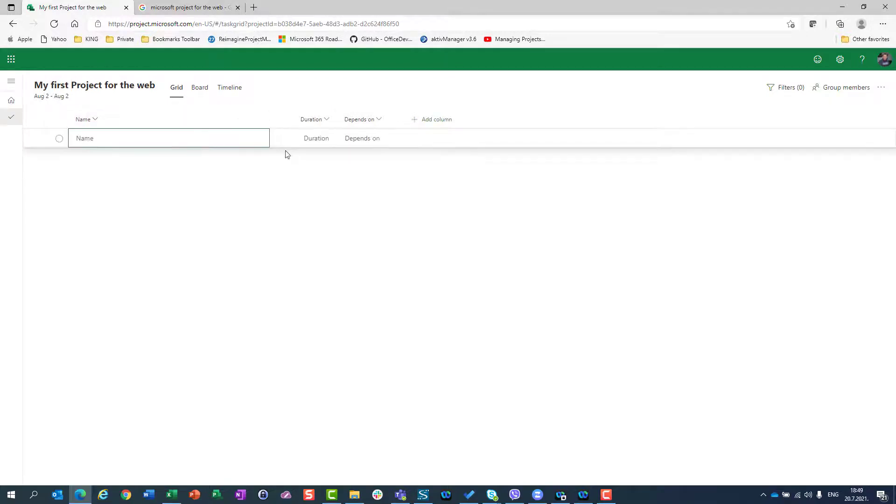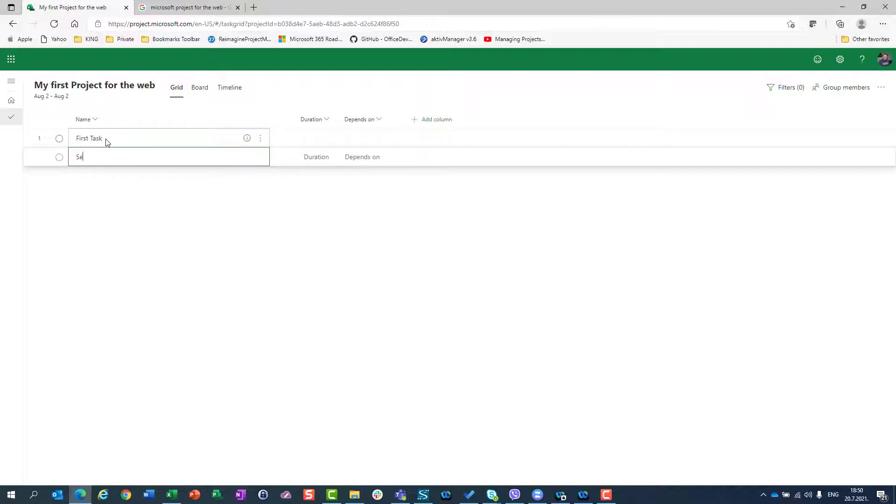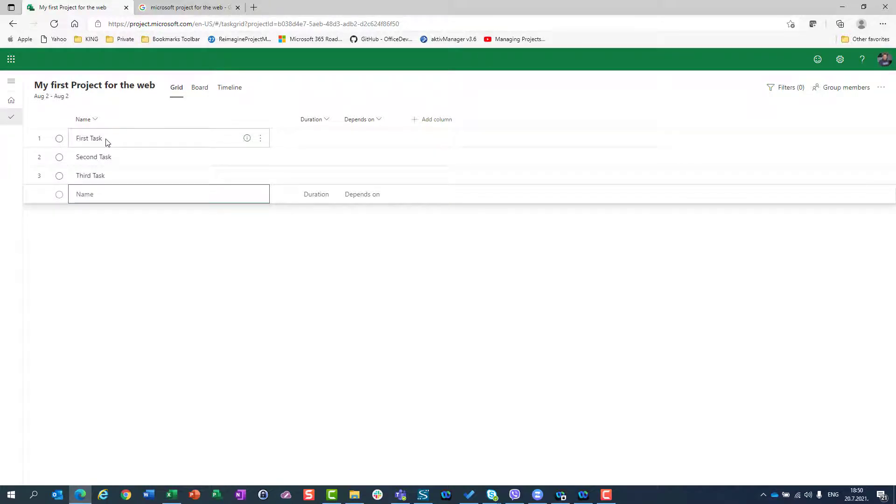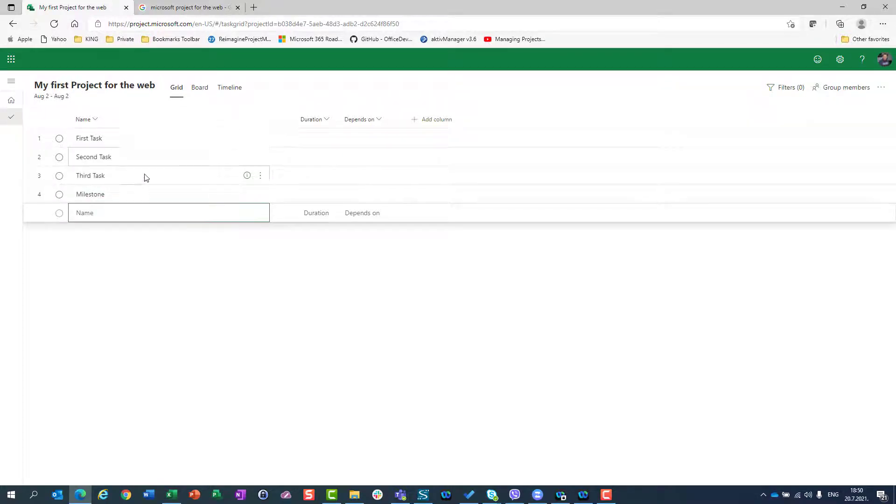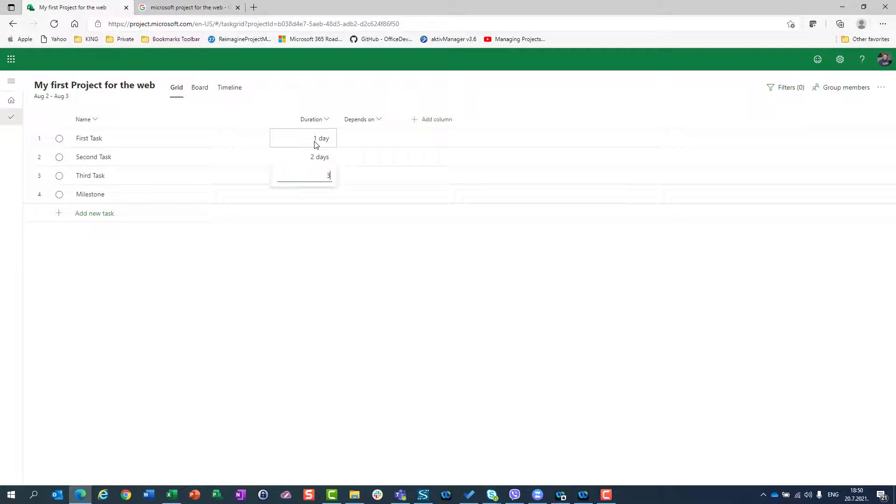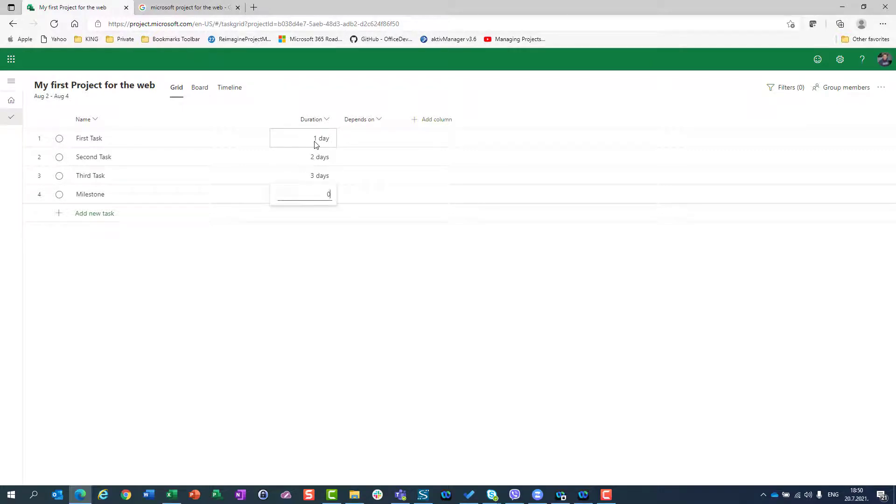Now I can click here and I will give my task name. First task. I will hit enter. Second task. Third task. And I will set milestone. Now I can click here. Duration. Let's say that my first task will be one day, will have one day duration. Second we have two days. Third we have three days. And milestone, as we know, doesn't have duration. So to mark some task as a milestone, you should put zero in duration. That's it.